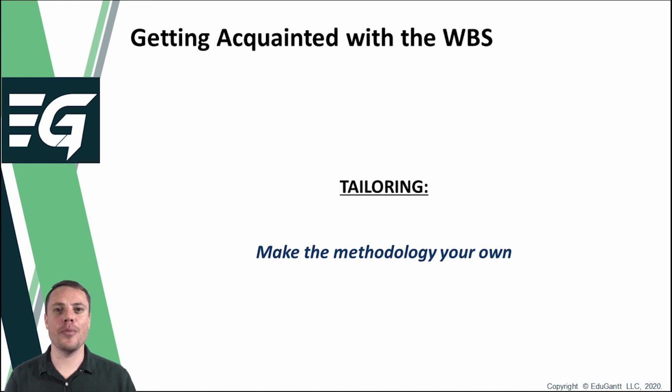As previously mentioned in this lecture, the WBS is an absolutely vital part of any project management methodology, but there exists some contention in project management practice as to how the WBS should be used and how it should look. As a general rule of thumb, it is suggested that the approach outlined in this lecture be used for larger projects. By not decomposing and representing the work up to activity level on the WBS, the document is kept shorter and more manageable. Further details can be provided in the relevant WBS dictionaries, and the information can be determined in the course of other project management activities. This is also typically in line with the more prominent methodologies such as PMBOK and PRINCE2.